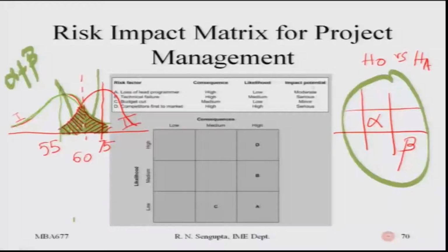So, the impact potential, likelihood potential and the consequences which you see here in both the matrix as well as the top table would be high and low depending on how you have been able to quantify the overall risk. If you want to be much more stringent, you will try to make more categories of high, very high, low, very low risk, and the consequence would also be mapped correspondingly in order to understand the picture in a better light.